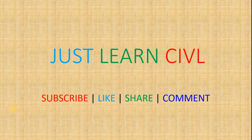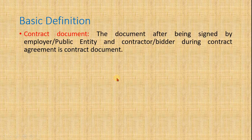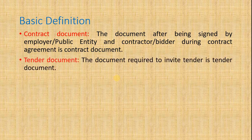Welcome to Jocelyn Sibyl. This is the second tutorial on contracts. We will learn about the difference between tender documents and contract documents. Contract documents are those documents which are signed by both parties — the employer and the contractor — and when they sign, that becomes the contract document. Most contract documents are imported from the tender document. Tender documents are prepared during the invitation of the tender by the public entity, but signed only by the public entity, not by the contractor.